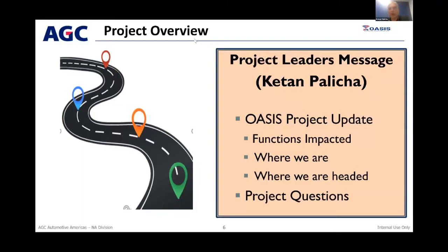Make sense? Okay. Now, we started you guys early. Keaton, have we ever defined what is a cycle? In the truest sense, a cycle is nothing but a collection of test scenarios. That's a good point. A cycle is just the way we can't test everything at once, so we break it up into manageable chunks, right? The core team works closely with the SMEs to do that. But more importantly, it's just a way for us to divide and conquer, right? So we start with the basic transactions, then we go into more complex ones, okay?